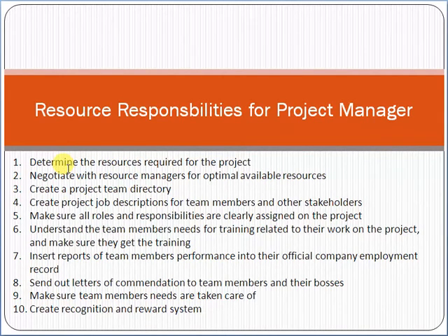Whenever you receive a project, first of all you need to identify how many and what type of resources you need. For example, if you are implementing an e-commerce solution for a customer, you need to identify how many human resources you need, how much funding is required, how much time will be required, in how many months you will deliver, and which type of hardware you need to implement the project. So all these types of resources.